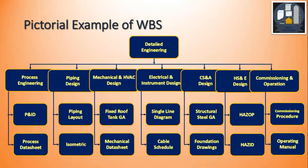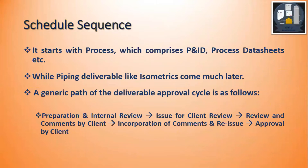These are just examples — there are many more deliverables, this is just for illustration. As we see in EPC, the phases are in sequence but there are considerable overlaps. Within the detailed engineering disciplines, it starts with process, but there are considerable overlaps between disciplines. Process comprises many deliverables like P&IDs, while piping deliverables such as isometrics come quite later.